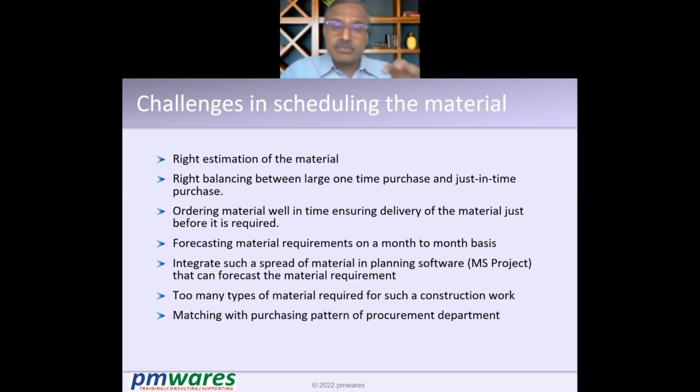Now, to manage this, you have to order the material well in time. So when you order and say, I need this material at this time, the order is placed, the vendor processes it and is ready to deliver, and can schedule and make arrangements for the material at the appropriate time when you need it, and supply at that time. So give some time to the vendor also to arrange it, right?